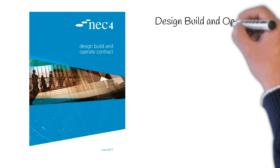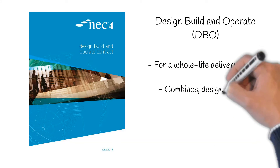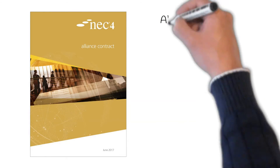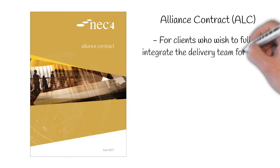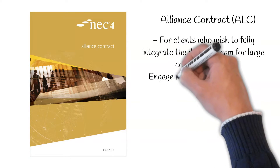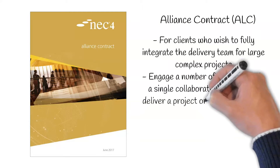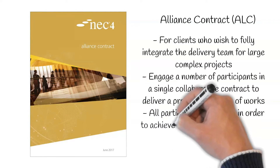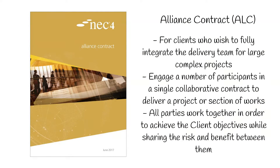Design, Build and Operate, or DBO. This allows for a whole-life delivery solution. It combines design, build, and maintenance responsibility for a single contractor. Alliance Contract, or ALC. This is designed for clients who wish to fully integrate the delivery team for large, complex projects. The ALC is used to engage a number of participants in a single collaborative contract to deliver a project or section of works. The basis of this contract is all parties working together in order to achieve the client's objectives while sharing the risk and benefit between them.